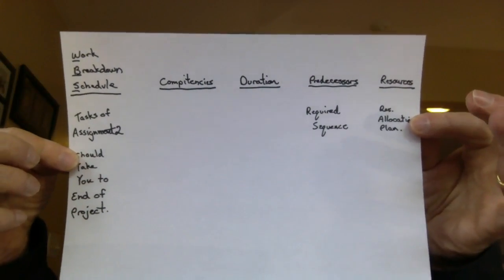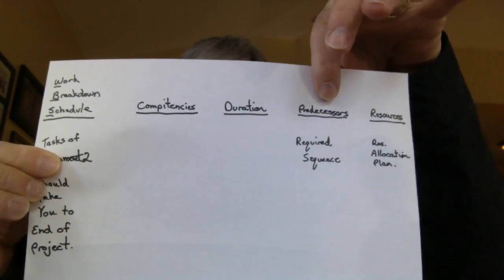Okay. The other thing just about the assignment that I want to highlight is that the example there is not complete, meaning there's a column that tells about the tasks, and then there's another column that says resources, but if you read the note below it, it says this is incomplete. So I'm not sure why the example isn't really a complete example, but what you need to do is actually really fill one of these out, and then based upon duration and predecessors, schedule out the tasks on a Gantt chart. Okay? So don't just send me something that looks like the example, because the example says in the fine print it's not complete. Okay? All right.